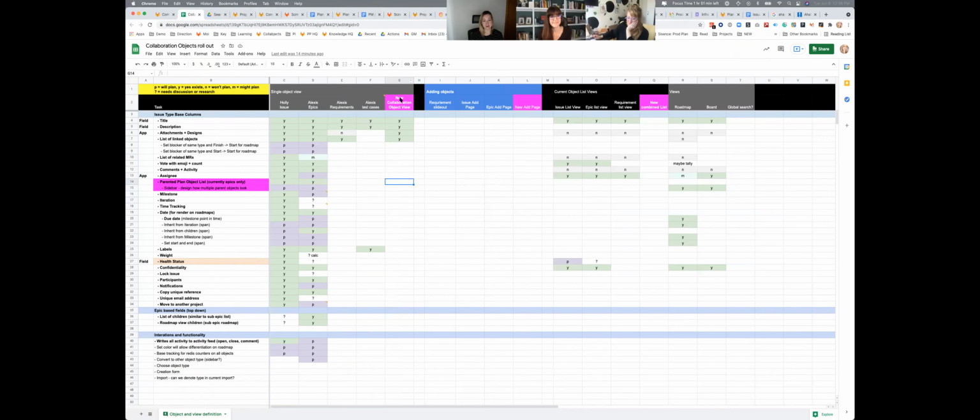This is the new, this will be stories. So this is the shared thing that will go live and merge back onto each of these different objects after. As soon as we get it to a certain point, it works for stories, then they can roll it out on issues. Epics will be a much bigger migration later because it's a whole other object, but we've added 3 months to the timeline. If engineering agrees, we'll have 6 months to get this new stories thing off the ground, and then 3 months after that to convert epics and do a migration.